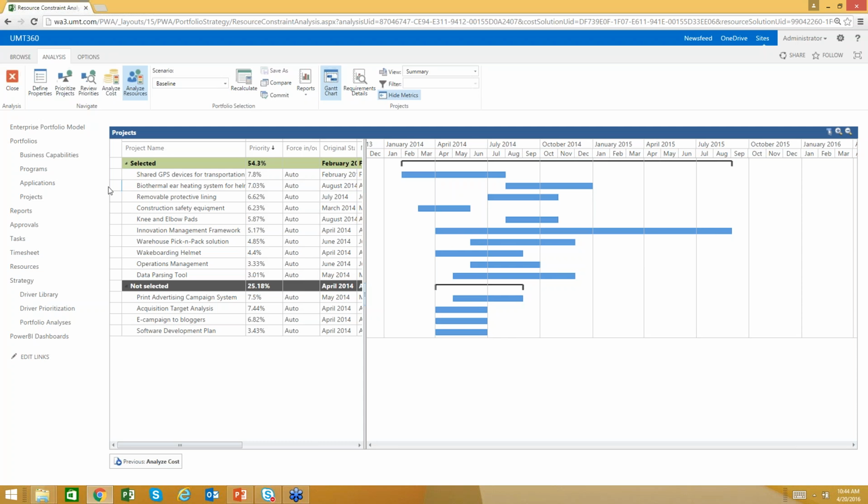What you tend to find, certainly in annual planning scenarios, is the projects naturally get front-loaded in that planning horizon, leading to a natural deficit of resources, let's say for the first 6 months, and a surplus of resources in the latter period of the year. So there are economies of scale or efficiencies to play around with the scheduling of the portfolio within that given planning period to better utilize the available resources before throwing money at the problem to hire in more. So it is a capacity assessment.